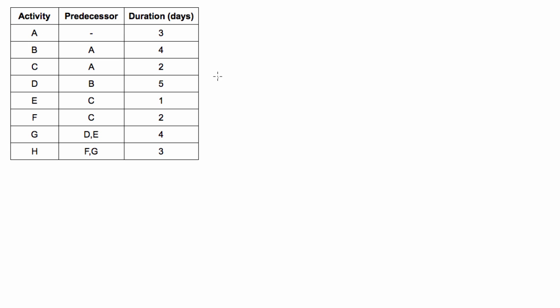So we'll start off with drawing a rough draft. We know that activity A comes first because there's no predecessors, so it's the first activity in the whole project.